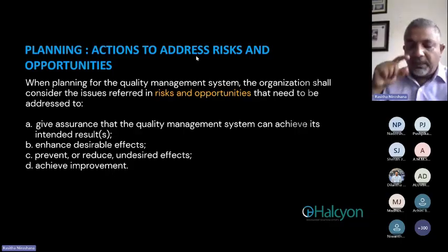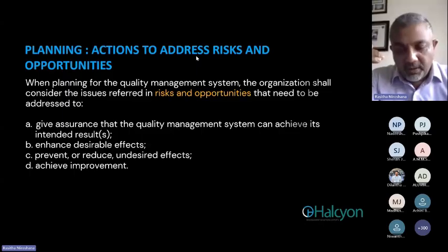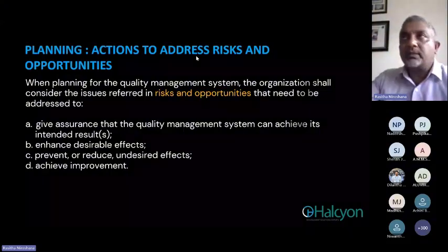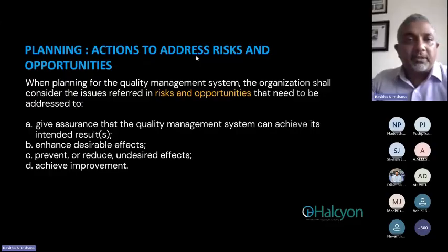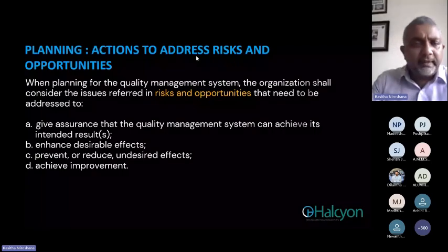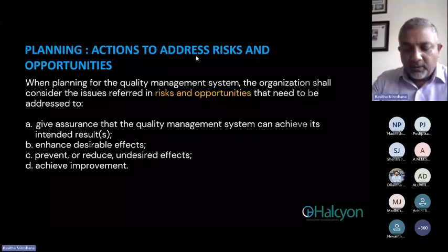Leshani, if we can elaborate this more. There are two activities you are talking about. One is the laboratory setup. Maybe you start with the funding, whether you have a fund, and then you design the location. You can't just bring in a laboratory like normal manufacturing or a house. You have to be specific whether this laboratory is microbiological or chemical. Then it depends.